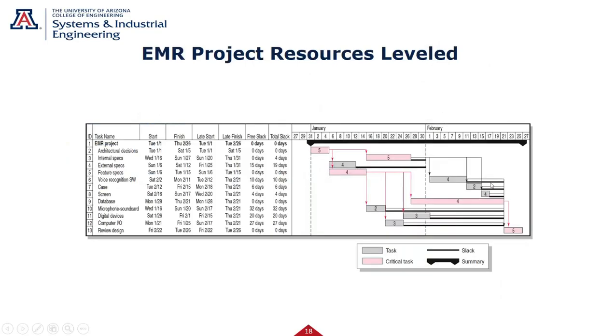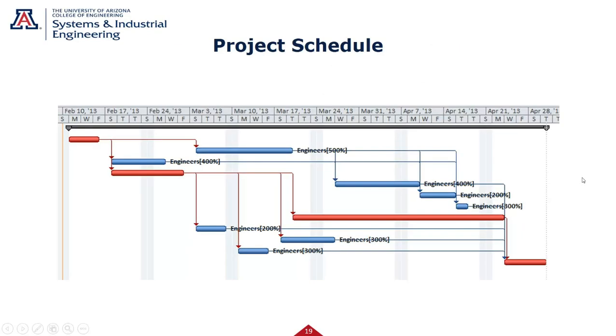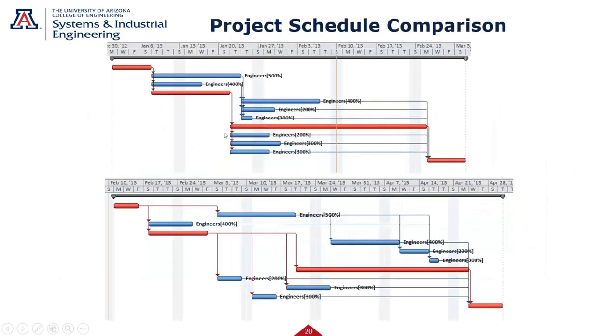And here's our new schedule from the book, but here's what I came up with in project. And here's what they are, kind of trying to do them side by side, or top to bottom, I guess, better terminology. So here was the original one, 45 days. Here's the expanded 57. You can see how the critical path changed a little bit, and you can see how it moved some of these tasks around to make this all fit. And so that's what we get when we do that.